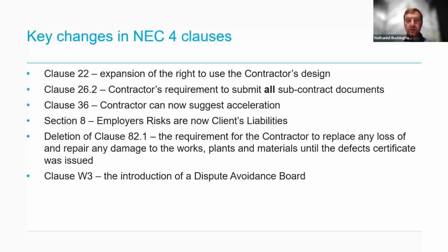Now, it's worth noting that NEC4 is still fairly light in dealing with copyright and intellectual property issues. This is increasingly an area of concern and focus for our clients in the industry, who will often require an ability to grant sub-licenses for the use of design or drawings produced, even just, for example, for marketing or other uses. And this area is likely to continue to be the subject of amendment Z clauses.